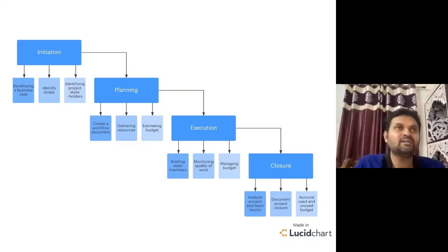We can't avoid it, which means it is very common. Sometimes the client requests us, kindly send your four laborers, we want to have work there. As a contractor, we used to do that. Okay, fine, take our four laborers. Sometimes they say, since you have the hydraulic excavator and you are doing the excavation, can you do just a surface dressing of this particular patch?